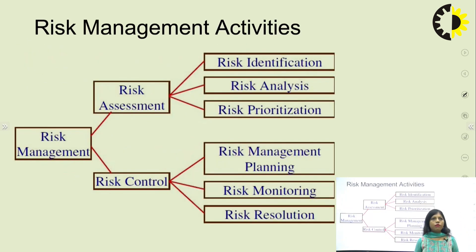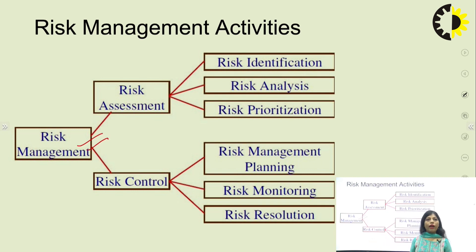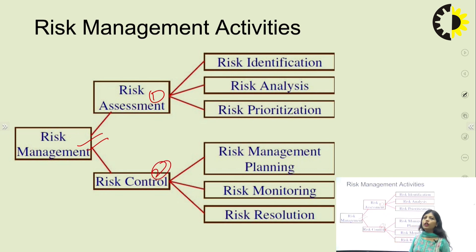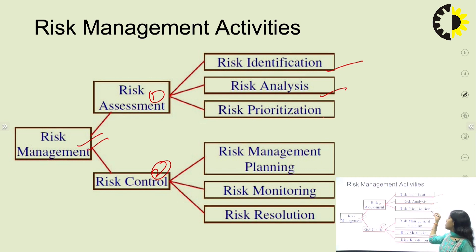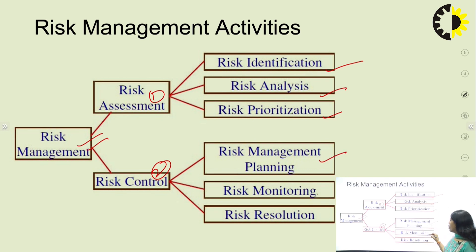Risk management activities consist of two main ways: risk assessment and risk control. In risk assessment, we identify the risk through risk identification, analyze it through risk analysis, and prioritize it through risk prioritization. In risk control, we do risk management planning, monitor the risk through risk monitoring, and perform risk resolution. Risk analysis involves examining how project outcomes might change with modification of risk input variables, while risk prioritization focuses on severe risks. Risk management planning produces a plan for dealing with each significant risk and records decisions in the plan. Risk resolution is the execution of the plan for dealing with each risk.